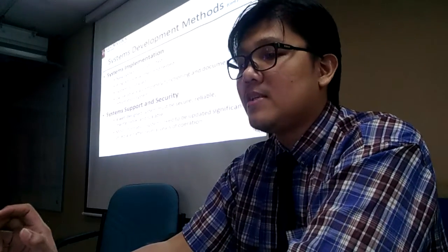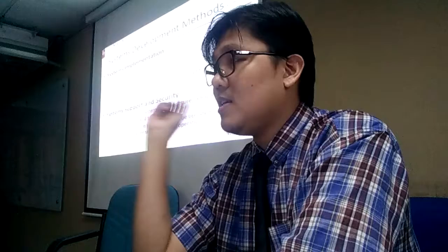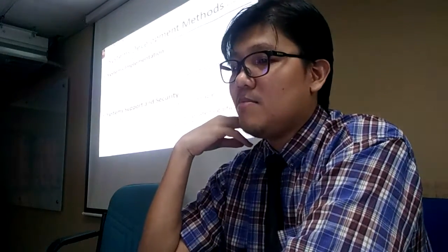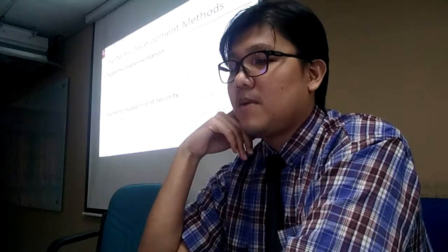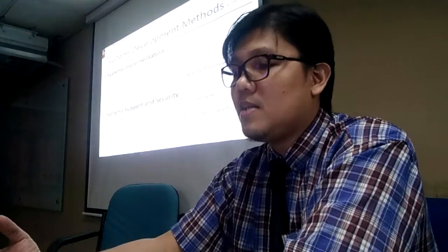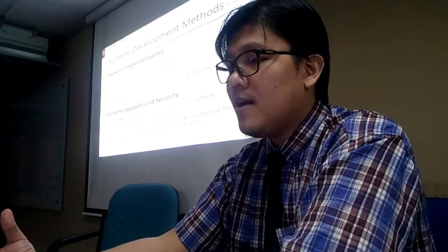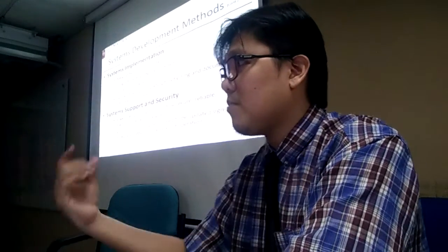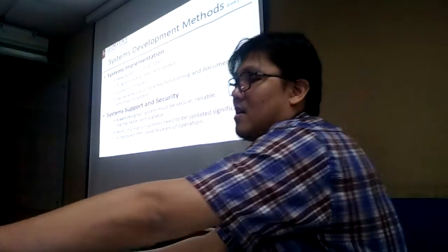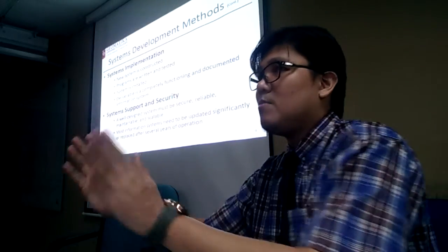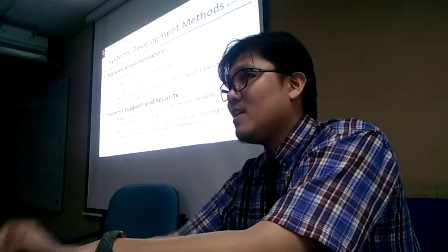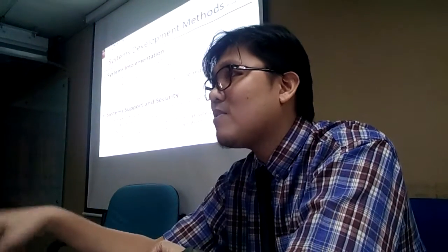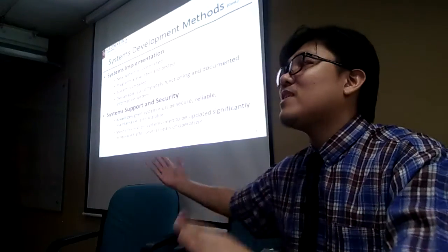Then we implement it. The new system is constructed, developed. Then programs are written and then tested. The system is installed at the implementation phase. The deliverable is a completely functioning and documented information system. Documentation is important. That will be the evidence. We discuss this kind of model, and then we sign. We agree on it already. At the next meeting, the client says, no, I want this change. No, you signed it already last time. We already agreed on this. Otherwise, it will be a never-ending discussion.